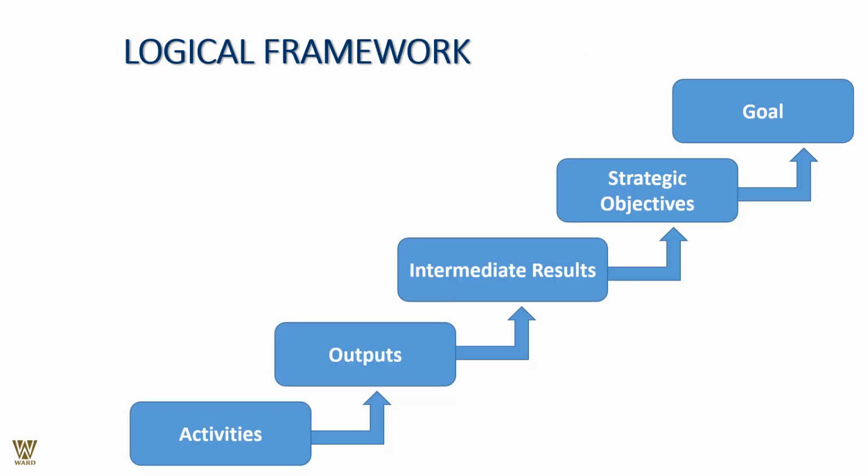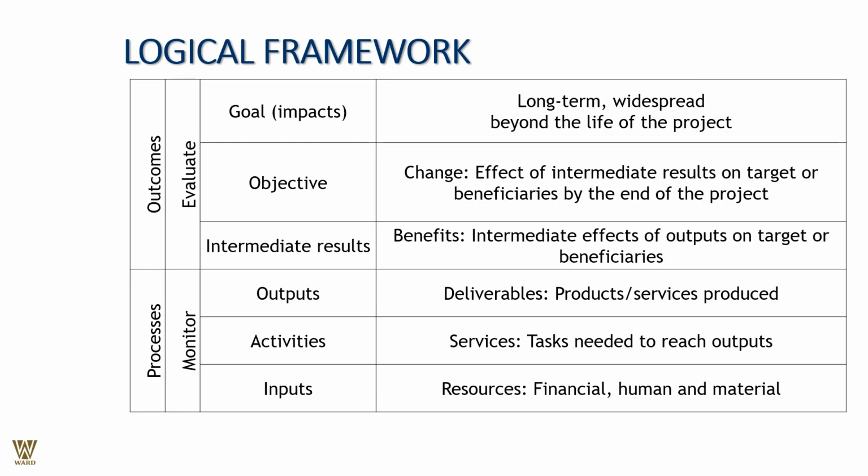So what is a log frame? Did I say logical framework is log frame, as the case might be? The log frame is nothing but we are talking only about the goals. If we can manage this goal. Now, how do we manage this goal? By planning right from the bottom as to which activities need to be taken care of. The activities will lead to the outcomes. Only with the outcomes will come the intermediate results. Intermediate results might be nothing but a series of outcomes which lead to the strategic objectives, perhaps the goal thereby. And that is what the log framework is all about.